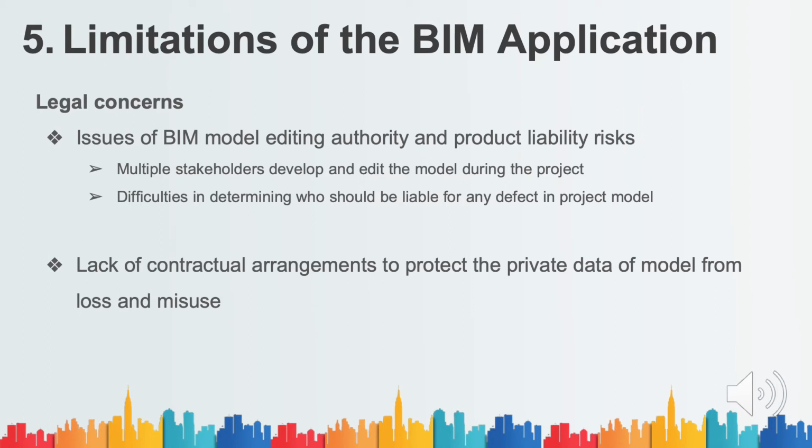Secondly, BIM application may create some legal concerns, such as the BIM model editing authority and product liability risks. As multiple stakeholders are constantly developing and editing the model during the project, it is difficult to determine whether the contractor or designer should be liable for any defects in the BIM model. Also, there is a lack of contractual arrangements to protect the private data of the BIM model from loss and misuse.